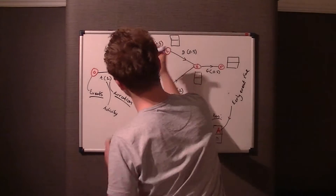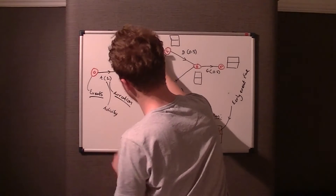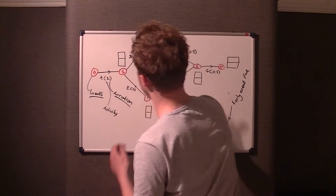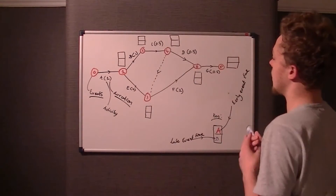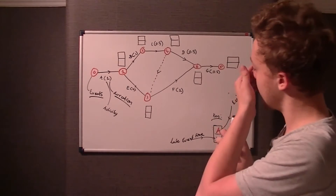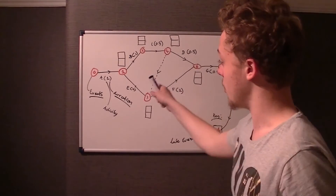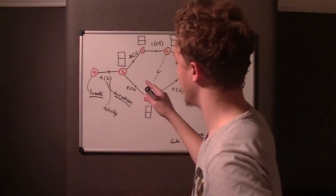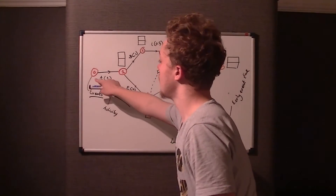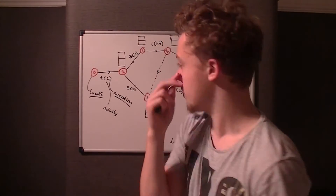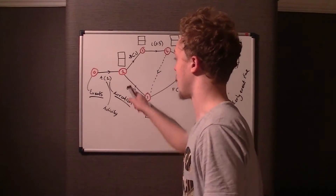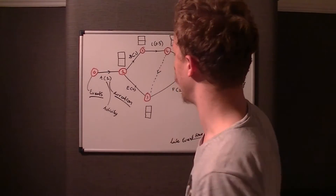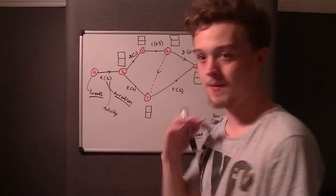The arrow between node one and two represents activity B with a duration of one. These arrows show that you must go from zero to one — you can't go from one to zero, that's what the arrow is showing.